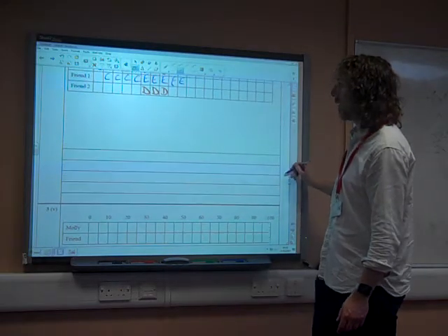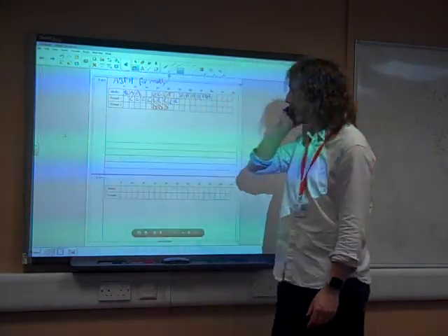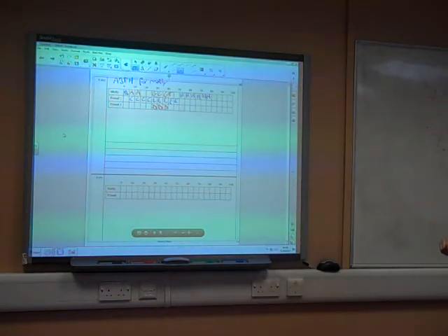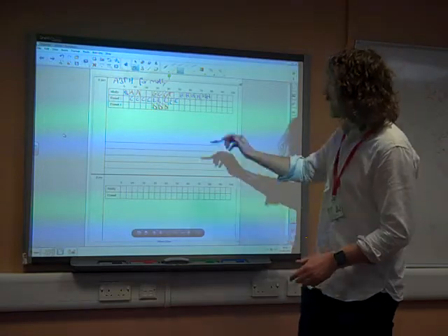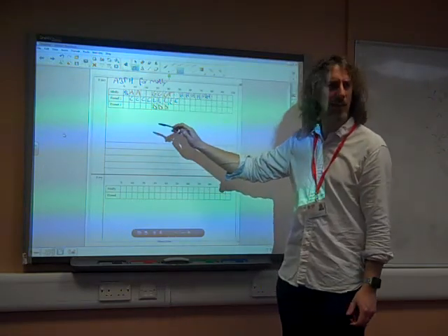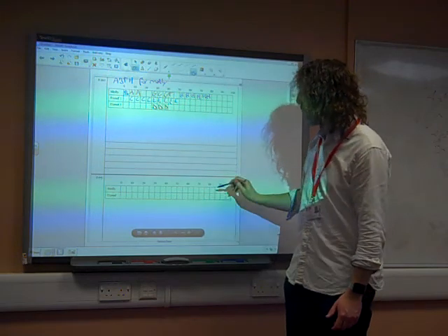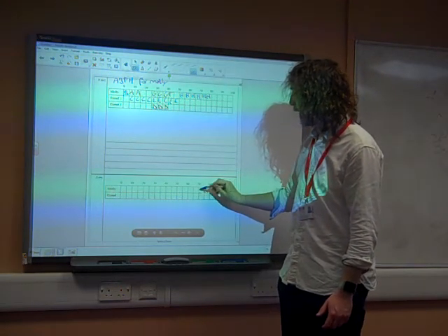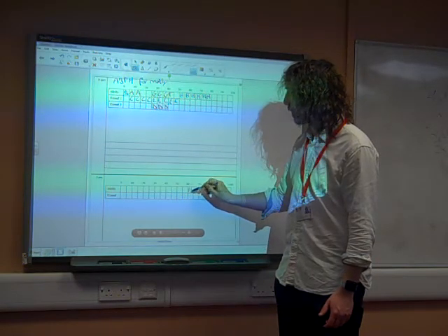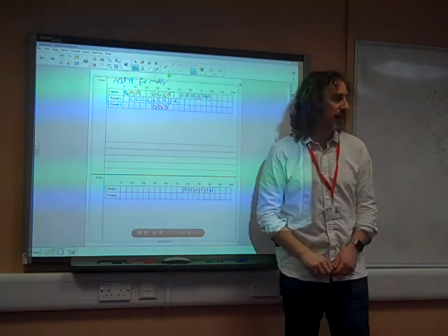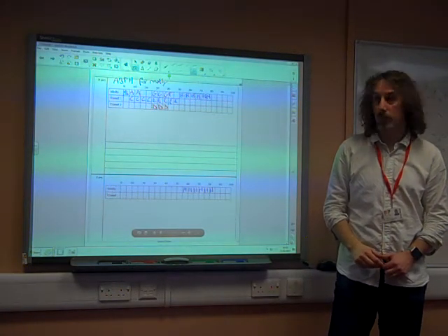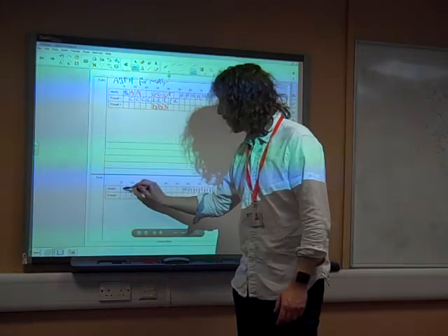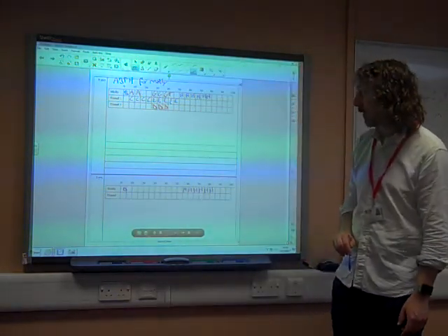So, is it possible for us to move some of these things around and get it done so that we only have a slight delay on the whole thing? How are we going to set this up? I think actually, if it's only going to be a 5-minute delay, H has to happen at the end. So I am going to start by putting H in there 5 minutes later, because whatever else happens, that's going to need to happen at the very end of it.